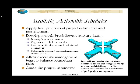All right, so the idea here is that we're going to try to get realistic, actionable schedules as a result of this, using best practices in project estimation and management, basically the same techniques that would be used to estimate a bridge or an airplane or building a house, anything. Those are known project management best practices and can be applied to testing as well as anything else. We do that, we should have a work breakdown structure that's complete, accurate, identified the risks, we balanced the different risks. We have commitment of the team, we've got individuals who said, yep, this is how long it's going to take, I'm going to do it, committed to that. And we've got the dependencies and the critical path clearly identified, and we're on top of the implications of that.